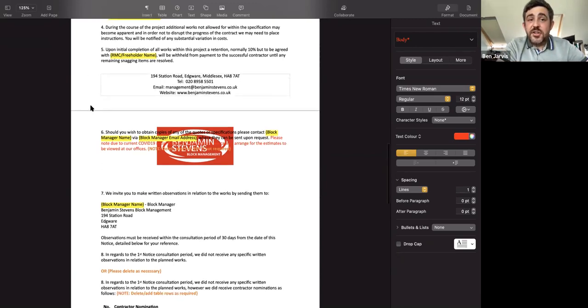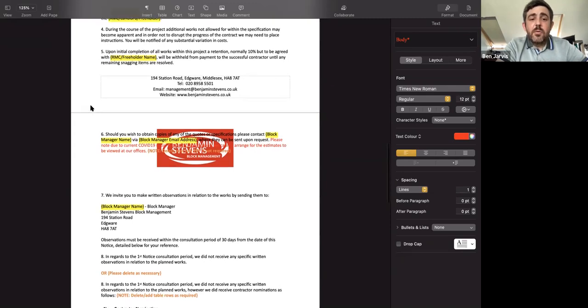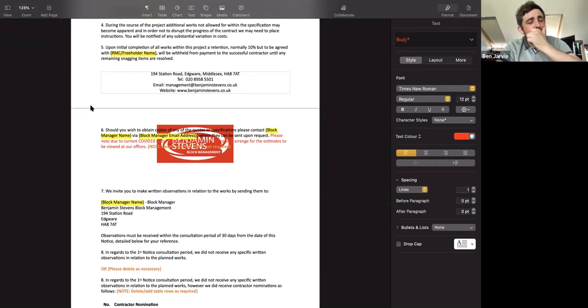We then advise about the retention to the successful contractor, but really importantly as well now, we don't, and I think back in the day, maybe companies did used to do this, but it's very important not to make any kind of advice who you feel you might be going with or who you are going to be going with, because that makes the entire second notice consultation period completely superfluous. It should be kept completely. There should be no information as to any contractor you may wish to or are going ahead with. As I say, it just completely takes away that need for the second consultation.